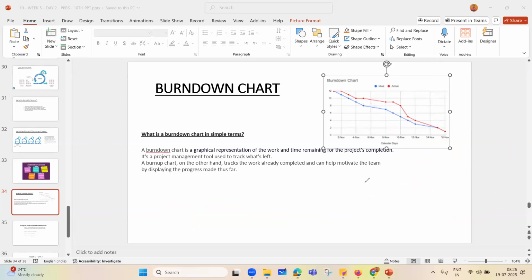Here is a tactic. Because you are going to be the Scrum Master, you will be changing the y-axis from story points to the total user story hours. Turn them into hours. What will happen then? Whatever work every single individual does on every single date will become visible. Okay, are you with me so far?